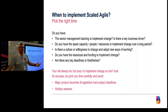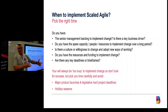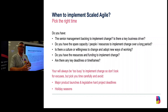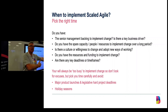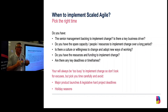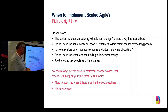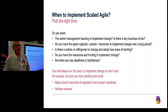If you're talking about a big transformation program, typically 18 months is a kind of timeframe. Smaller, simpler models are quicker; more complex ones across a whole organization could take longer. You're going to hit holiday periods and deadlines, but at least start your program — say in September — where you've got a nice run and an opportunity to do some work. Pick your time well. If you start in summer when no one's around, you're not going to get any momentum, and without that traction, something starting flat just continues that way.